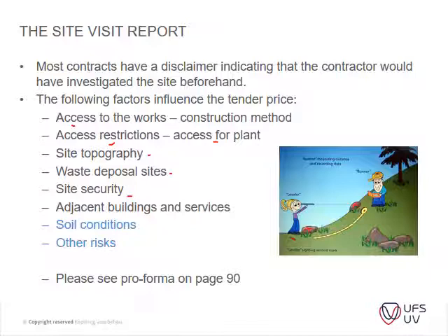Or is it located somewhere where the crime rate isn't that high? Obviously that will influence your security tariff. Is it located on a mine? Is it located in a red zone or orange zone, or a green zone maybe on the mine, which will also influence how you price your P's and G's.